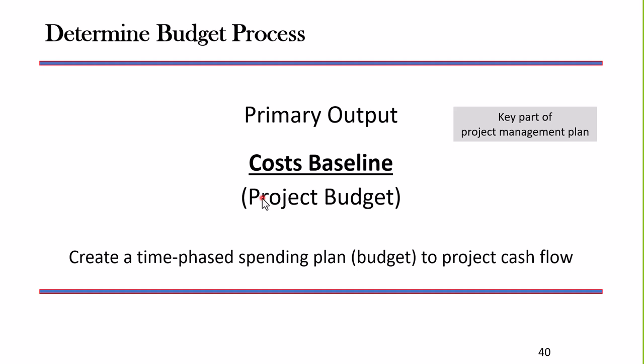I may end up doing some what we call funding limit reconciliation. What funding limit reconciliation says is, I'm going to send off my budget to the CFO, let them review it to make sure we can fund this project as it is planned. Now, maybe that CFO says, no, we've got the big payout here at a low revenue, high expense time. Let's push the project out. So we may have to push the project out to satisfy the organization's ability to pay for the project. And that's a common thing that we might do.